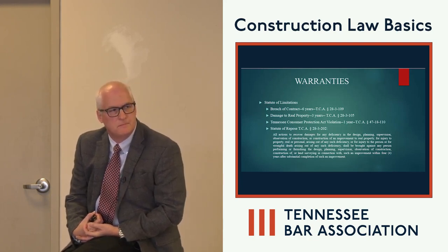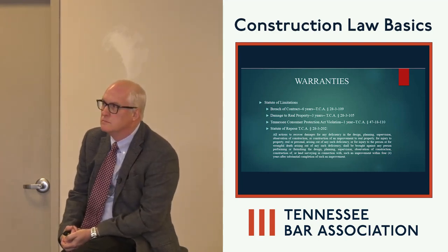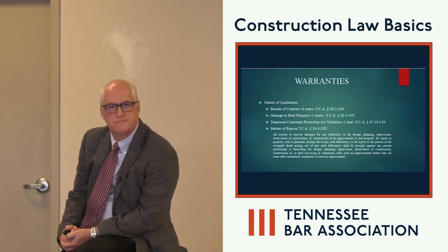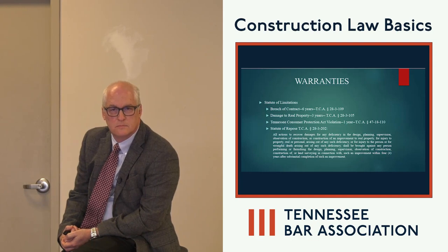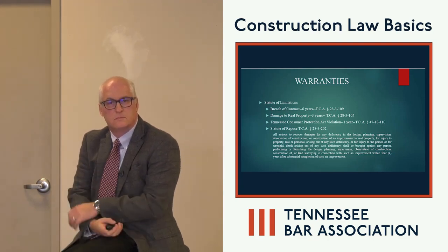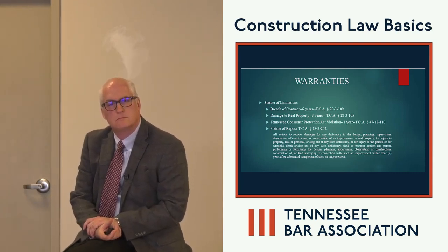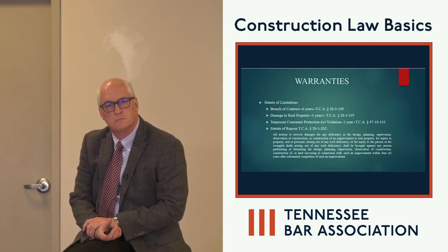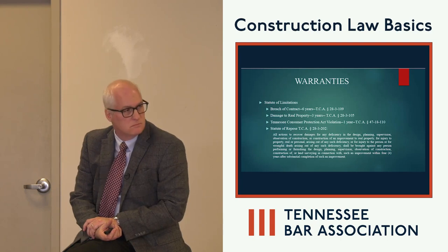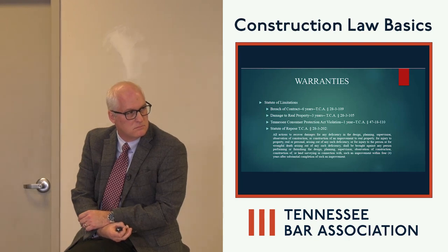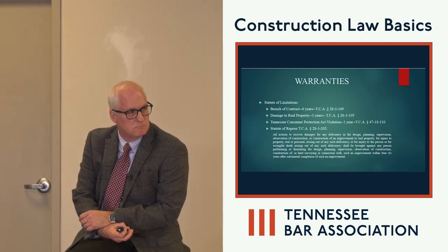And the tie-in to the warranty, why it's very important for warranties, is if you look at the AIA commentaries, the reason they wrote their contracts that way is they're used in all 50 states. And they didn't want to come in and say what a warranty is where states' laws can be different. In general, they would say that a warranty extends to the limitations or repose, that's why it ties into warranty. That gets litigated. And I read a case just the other day that was talking about how they can use warranty periods shorter than the limitations period in order to minimize their limitations periods and make them smaller. So I thought that was pretty clever.